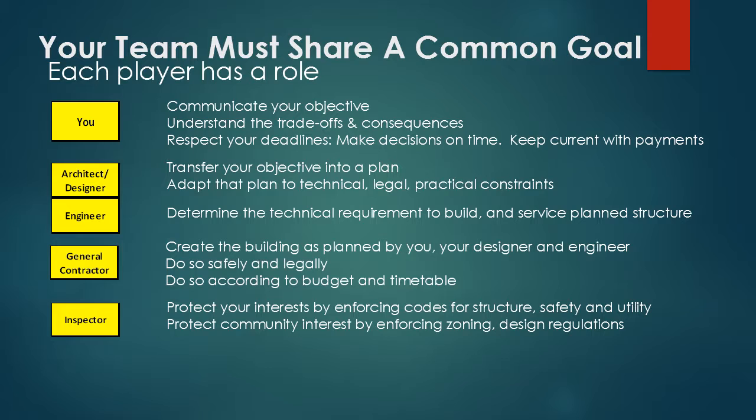In fact, it will most often be your architect or your builder who will work through the permit process, but you should make an effort to be part of the dialogue. Getting your permit will not be the last you see of the permitting office. Depending on the scope of your project, you can expect a number of on-site inspections. The purpose of these is to make sure that the construction meets code and the building is going forward according to the approved and permitted drawings.